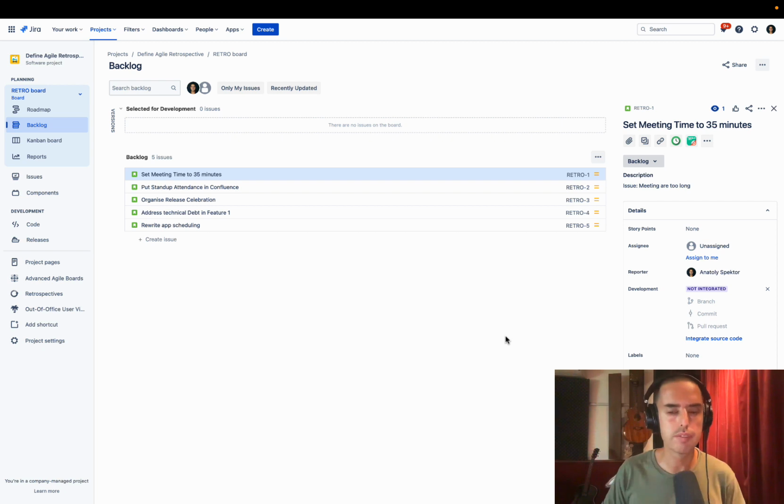So we did two things. First, we figured out what the issues are, and then we came up with some solutions. But as you know, we also need to figure out what we can take, what are the most important things. This 80-20 rule, we're focusing on the most important things, but also want to see which of them are low-hanging fruits, which of them we can also easily do. And we'll start with the ones that are more important and easier to do. To map that out, we will use Advanced Agile and Kanban boards. So let me show you how that looks.